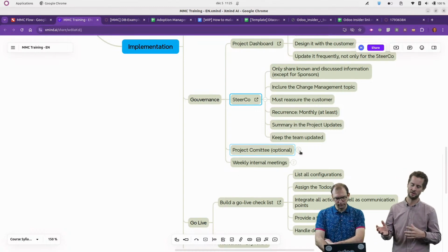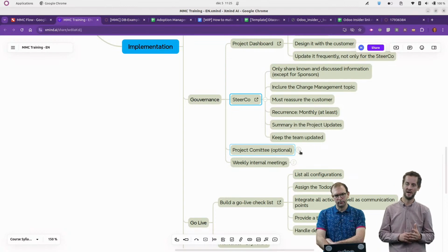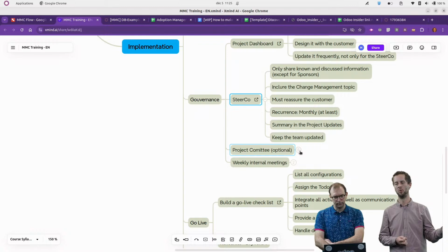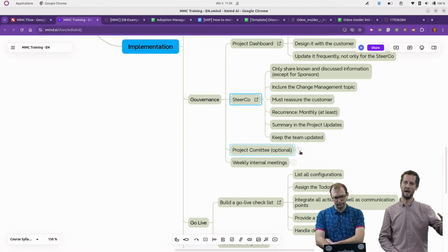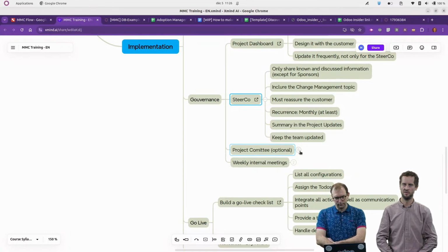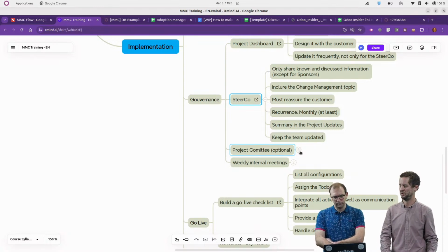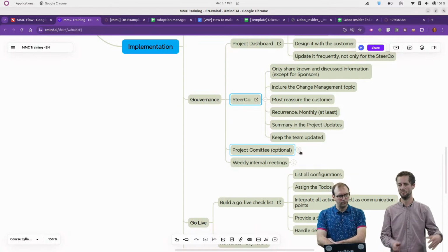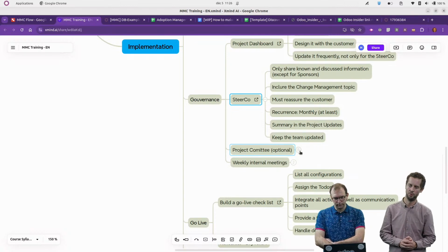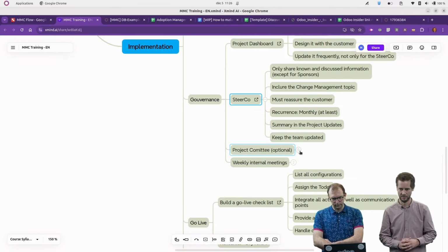So you can see that projects can go very fast in terms of go-live, because here we went live in 6 months. But then we can continue to improve and bring additional features or value to the client for a very long period. Most of the time, I think within 2 years, the projects are fully done and fully transferred to the support team.